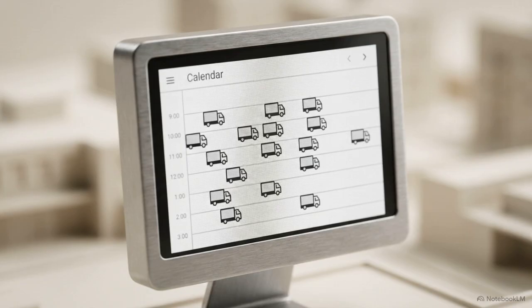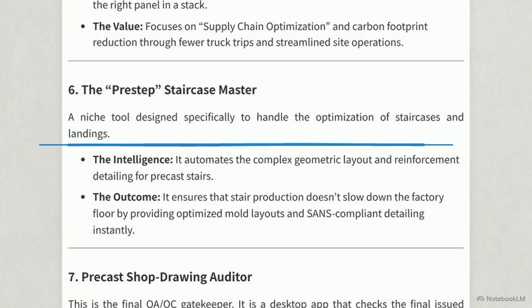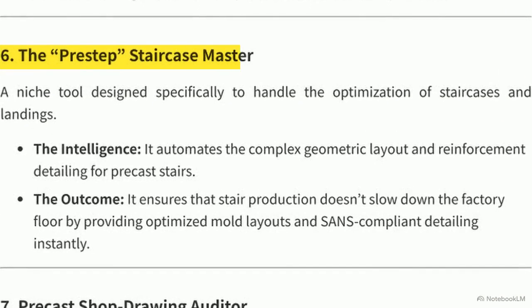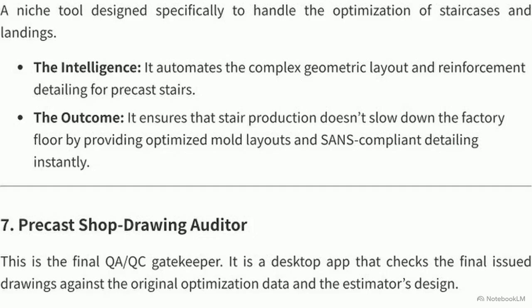Generating this exact loading schedule minimizes the total number of truck deliveries required and prevents the costly site delays that occur when a crane operator is forced to hunt for the right panel buried in a stack. The ecosystem also extends into niche, highly complex geometries. The pre-step staircase master automates the layout and SANS-compliant detailing for precast stairs, ensuring specialized assets don't interrupt standard production rates. Before any of this material moves, it must pass the final quality assurance gatekeeper, the Precast shop drawing auditor.